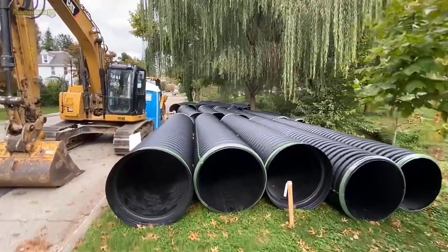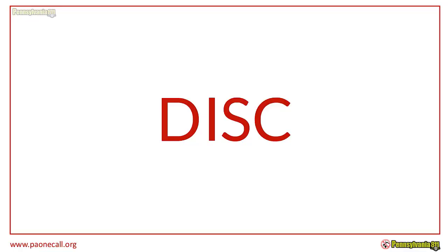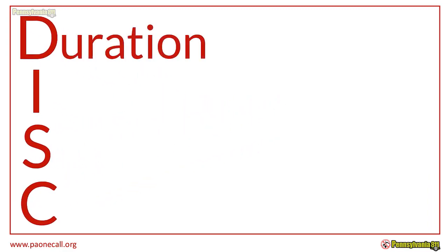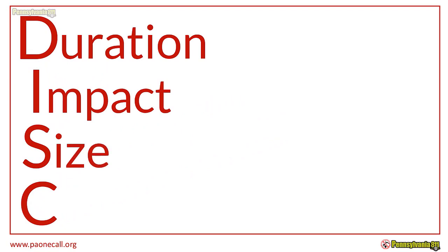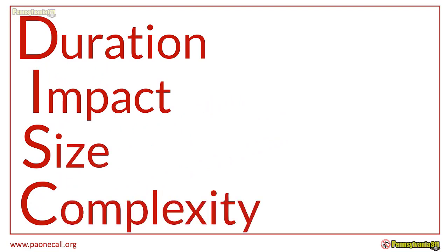That's a perfect example. To determine if a project is complex and should be entered into CPA, we use the acronym DISC. It stands for Duration, Impact, Size, and Complexity. Any project meeting one or more of these criteria may benefit from being entered into CPA and going through the process we're outlining today.